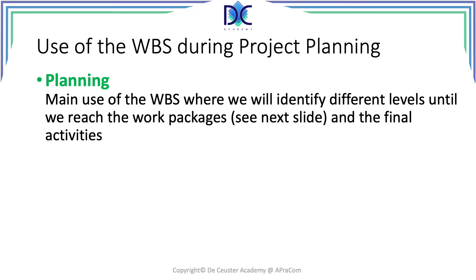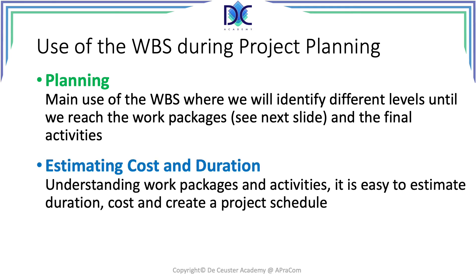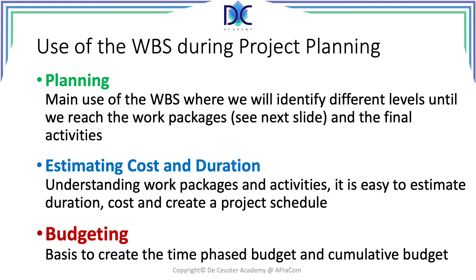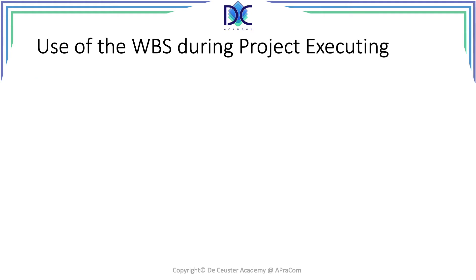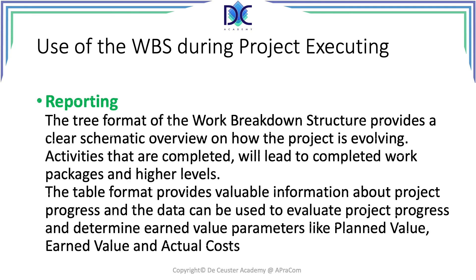During planning, which is the main use of the WBS, we use it until we reach the work packages and define the final activities. We can also use it for estimating cost and duration — once we understand what the work packages and activities are about, it becomes easy to estimate duration and cost and create a project schedule. We can also create the time-phased and cumulative budget based on the WBS.